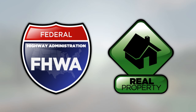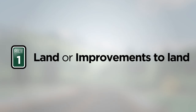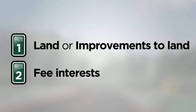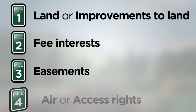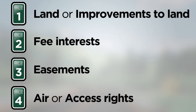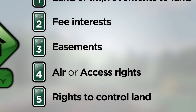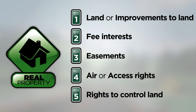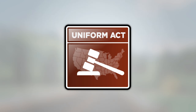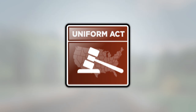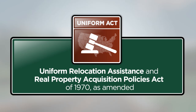Real property is a term used to describe land, improvements to land, fee interests, easements, air or access rights, or the rights to control land, such as leases. The primary law governing right-of-way acquisition and relocation activities on Federal-aid projects is referred to as the Uniform Act, short for the Uniform Relocation Assistance and Real Property Acquisition Policies Act of 1970, as amended.